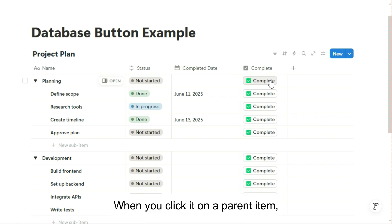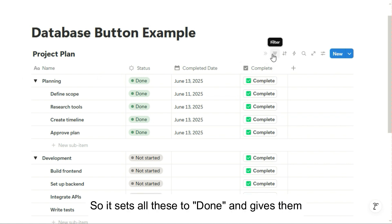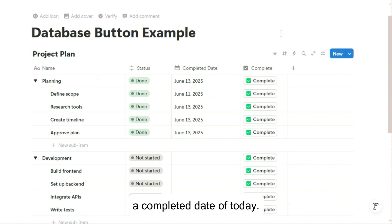When you click it on a parent item, it edits the parent and all sub-items that are in progress or not started. So it sets all these to done and gives them a completed date of today.